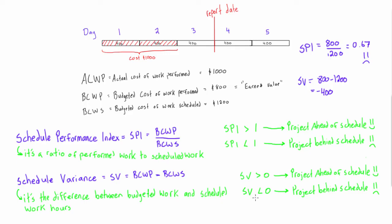And we look down here. If schedule variance is less than 0, the project again is behind schedule. So that stays consistent - we get a frown face.